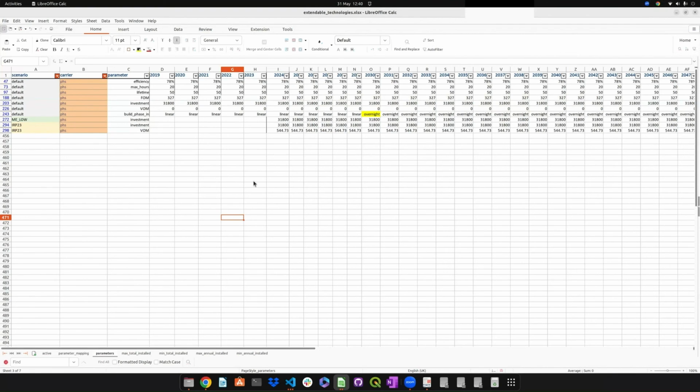So you're looking at 31,000 kilowatts installed. I think one of the key parameters is how long does it take to build? Because that's what I think kills pump storage in quite a few models. Sorry, I'm afraid you're breaking up a bit. What's quite important is also how long does it take to build the pump storage? Because if it takes 10 years or 5 years, your economics will be very different.